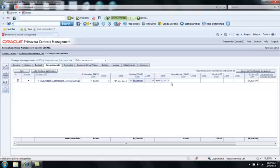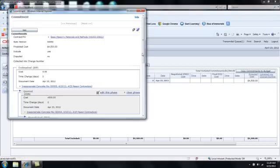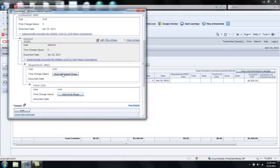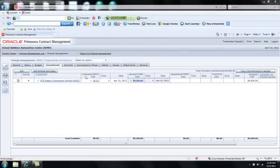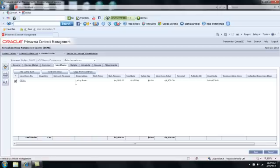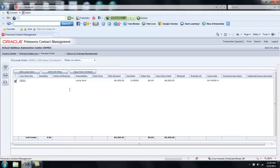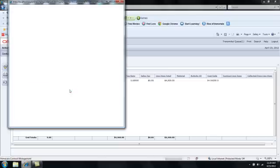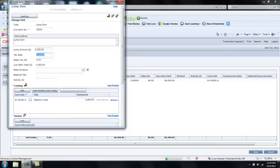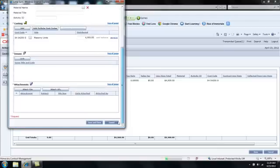As the general contractor, I may want to negotiate with Ace Mason to see if he can perform the work for a lower fee. That's just a matter, once again, of clicking the notebook. Start the negotiated phase. At this point, we've elected to create a document called a proceed order to document the negotiation phases. To document the dollar amount, I'll click line items. Once again, edit. And I'm going to ask Ace Mason if they'll do this work for $4,300 versus $4,500. And again, making sure that I am distributing it to the appropriate cost code. And I'll save and close.